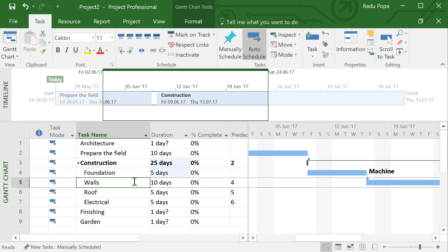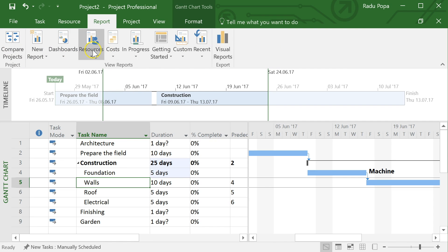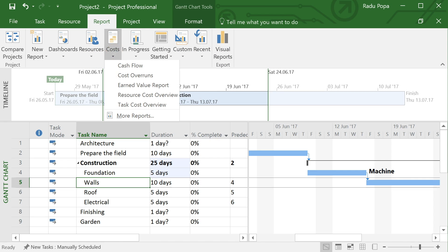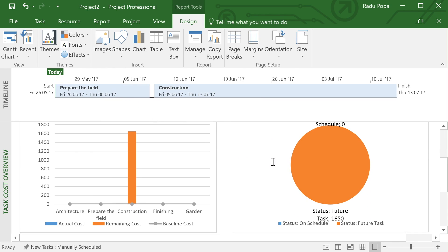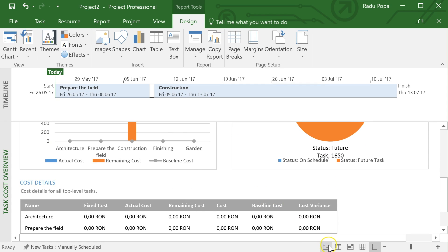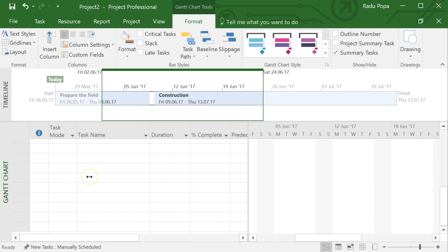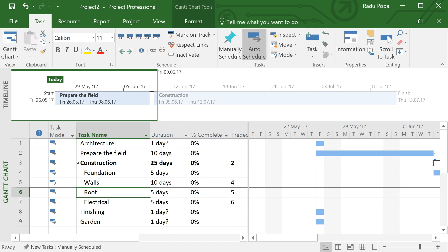You might ask: what's the point of assigning resources? The point is to be able to generate cost reports, so you can see how much money you're spending on a project. That's why there's a Reports tab. There are multiple types of reports and you can create custom ones. For example, 'Task Cost Overview' shows how much money you'll spend on each stage of construction. This is why you assign resources — to extract meaningful reports as the project progresses.